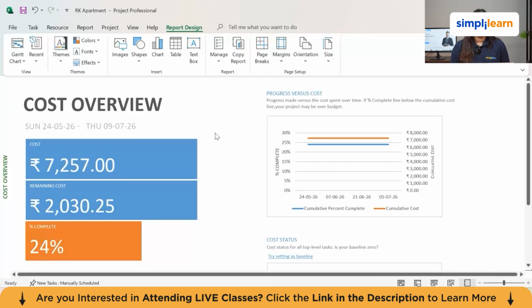Again, you are over budget. The estimate at completion, that is EAC, is the total approved budget divided by the CPI. If the budget is 10 crores and your CPI is 0.90, the EAC is 11.1 crore. That is what the project will cost if the current performance continues. That is the actionable information, and MS Project calculates it all automatically.